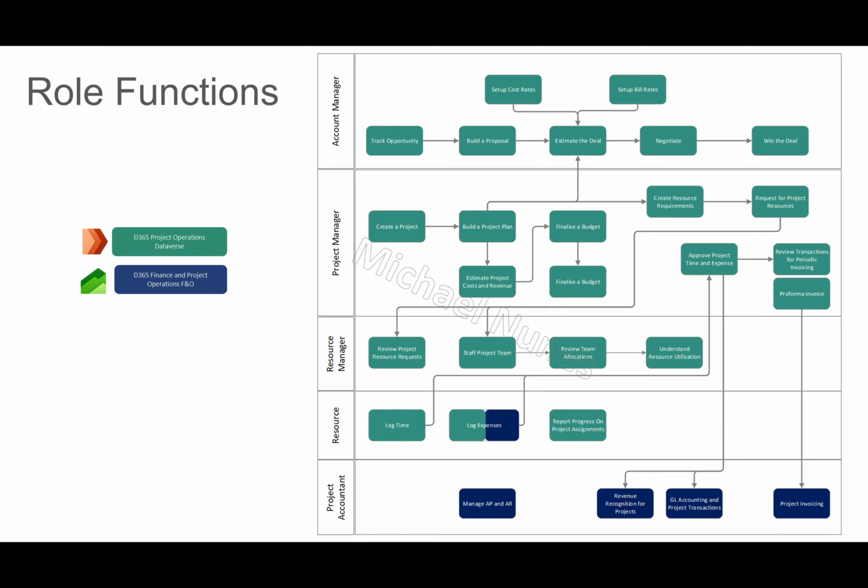The project manager can create a project and also help with the estimating, but they can also directly create a new project, build a project plan, and estimate the project cost and revenue. This builds up the budget, so whether it's timesheets, so time, hours, expenses, or material, it has one budget that it works with. From our project plan, we can then generate resource requirements, and the resource requirements can then be submitted to the resourcing team for allocated resources to the project. Of course, the project manager can also do that as well.